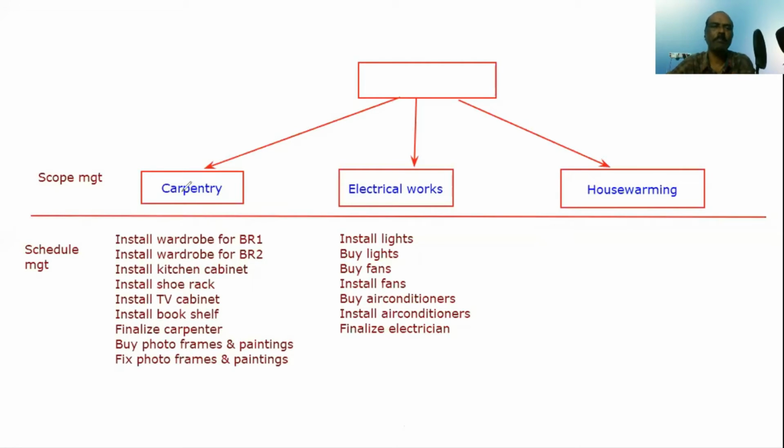For example, like carpentry. Right? Maybe start of carpentry work could be a milestone. Finish of carpentry may be a milestone. Yeah, a milestone is the subsequent activity to start. It's a constraint. Without this, we cannot start the next activity. It could be a constraint, or it could be more like a significant achievement in the project.